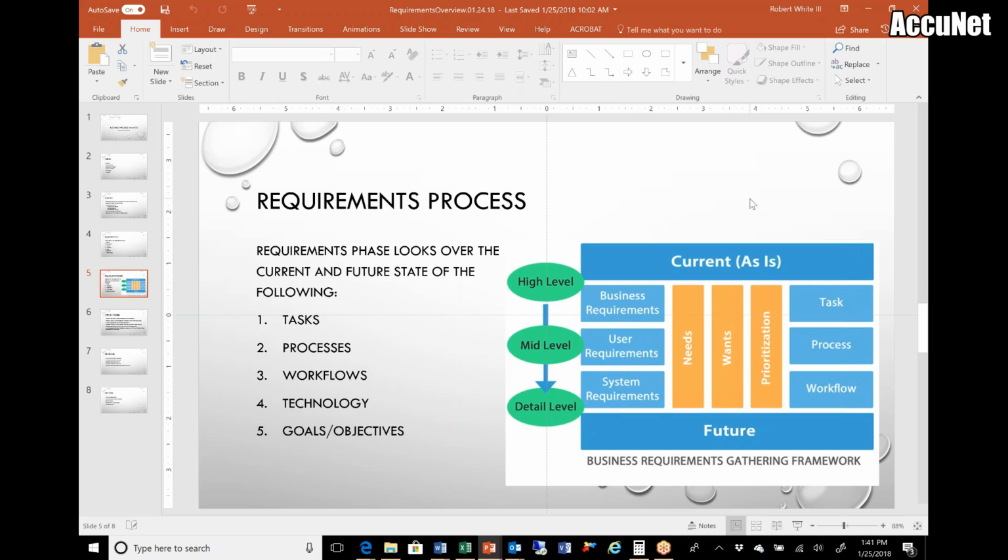Yep. And a lot of times these are done through, I like using Agile for these, kind of just getting right into the use case itself. So if there was a process, and of course we've got to enter customer data, well, that's a need. I've got to be able to do it, right? But is there an automated way to get that customer's information? That would be a want. But the use case itself would be, I need to enter customer data into a particular screen. And then based on those, we can prioritize, which is doable.